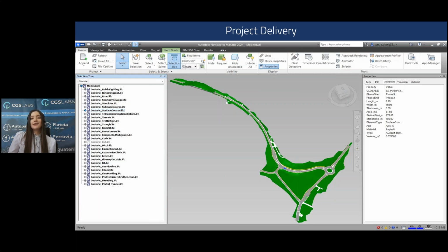This can be done with the help of programs for reviewing BIM models such as BIM Collab, which allow visualization, commenting, and marking of models. The client must also verify that all requirements from the project brief and BIM execution plan are met. And if any deficiencies or errors are found, the client must request correction by the designer.